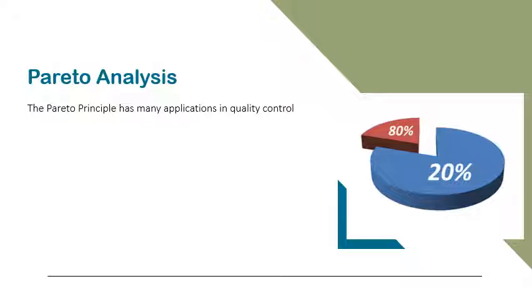In PMBOK, Pareto ordering is used to guide corrective action and to help the project team take action to fix the problems that are causing the greatest number of defects first.